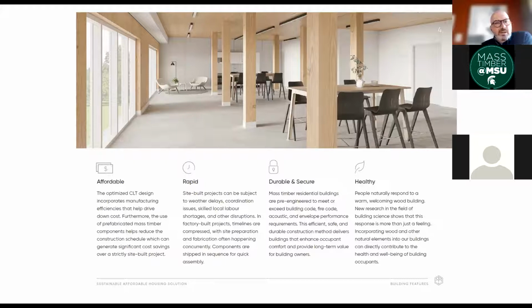The building is really rapid to assemble. So we bid the YW project at the end of February. I don't think we received the contract on that building till around the first week of May. Bear in mind that when we won the contract, we didn't even have drawings because it was a design build tender. So from the beginning of May, we were able to get building permits within 6 weeks, and we had our first materials arrive around the 3rd week of September.